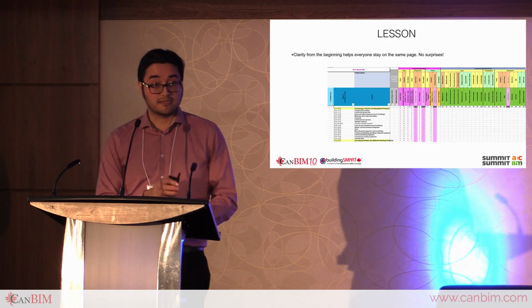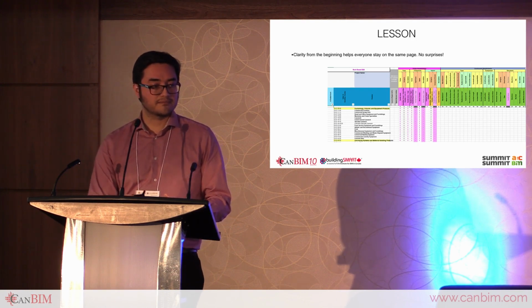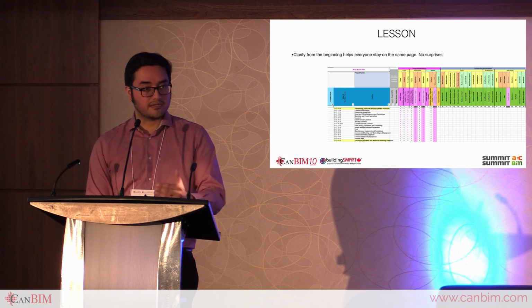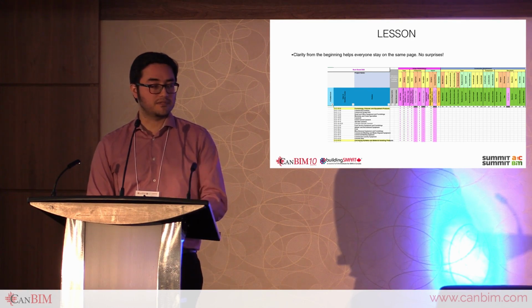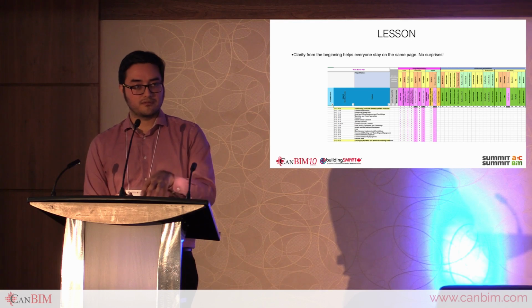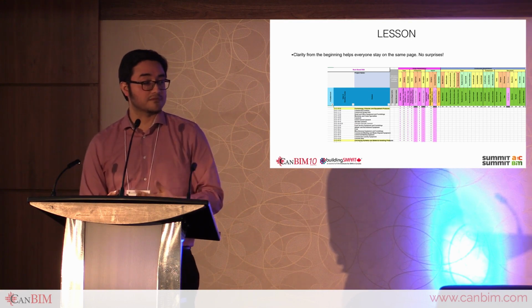And part of this is that it's very important to have clarity, right? If we're expecting that there's not going to be a change in how much a project will cost, we need to have clarity from all participants, both design and construction, of what is expected of them. And the latest iteration of that is what we call a data and geometry specification that tries to capture, again, what assets are in the model, what assets are tracked by an individual building owner, at what point in design we are expecting to see that information, what information or parameters will be provided by the design team and which ones will be provided by the contractor or trade afterwards.